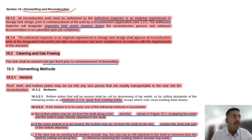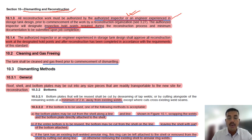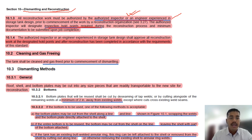If you want to do any plate replacement or welder qualification, you need permission from the authorized inspector or engineer. This is a close-book exam question. The authorized inspector will designate hold points — hold points mean the work cannot progress without the presence of the authorized inspector. The authorized inspector or an engineer experienced in storage tank design shall approve all reconstruction work at the designated hold points.